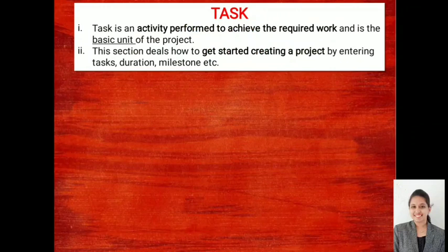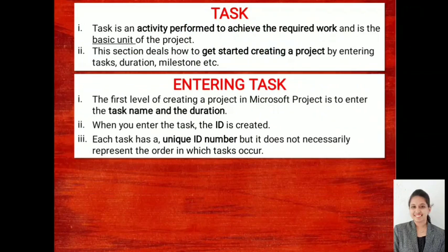Now we'll spend much of the time in the project adding and modifying these tasks. So first let us see what exactly we need to do, what is called entering the task. The first level of creating a project in Microsoft Project is to enter the task name and the duration. Once we apply the task name and duration, with respect to that we can apply the various resources, you can estimate the cost and all the other things, but this is the primary input we have to give for a particular project.